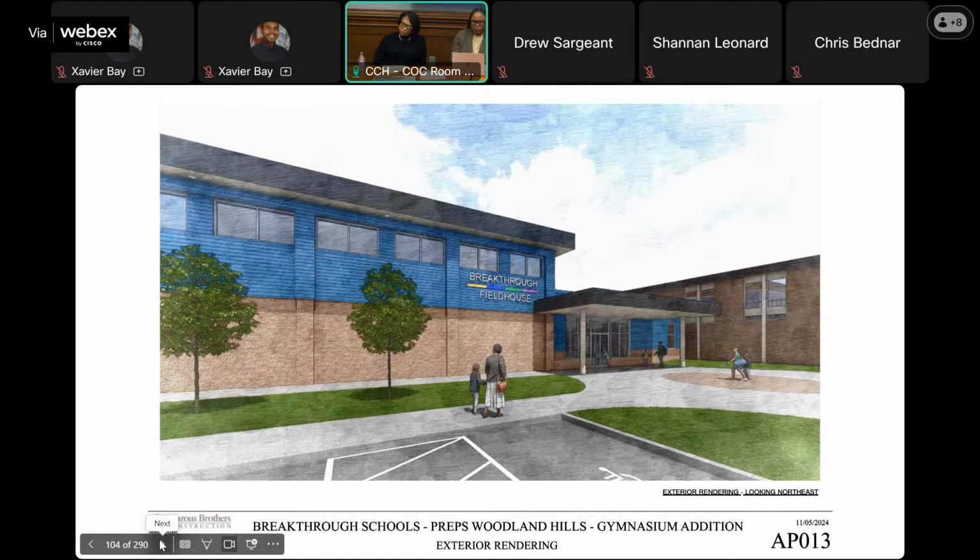We've done IFC review on the dimensions and radiuses that we have here. And this is something that I've reviewed informally with the fire marshal this morning. We believe we're well within our requirements for radius turning and distance. We do not need to have the fire trucks come directly against the building. So this is the way that we're proposing this.